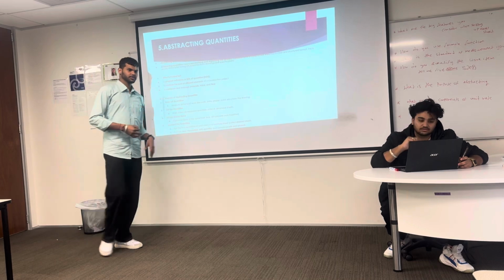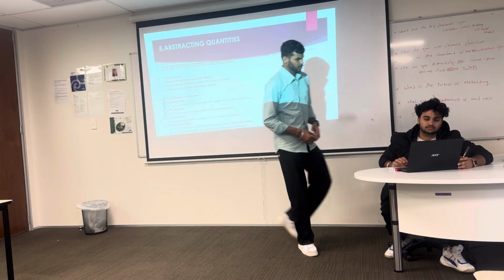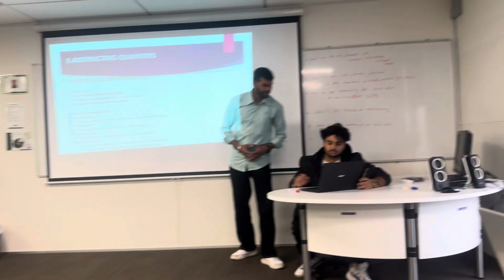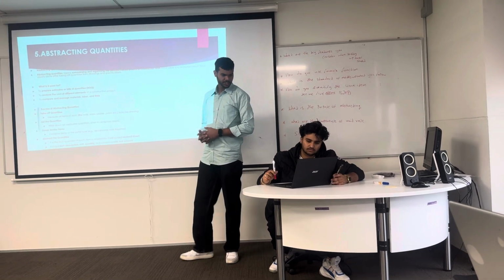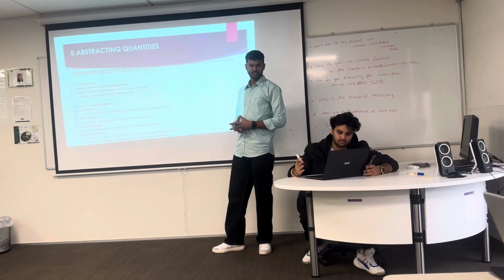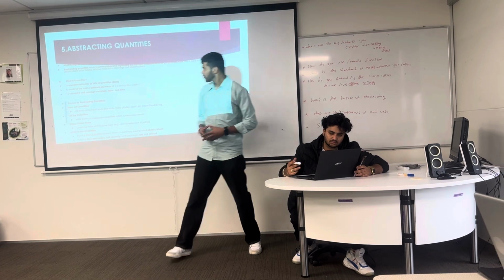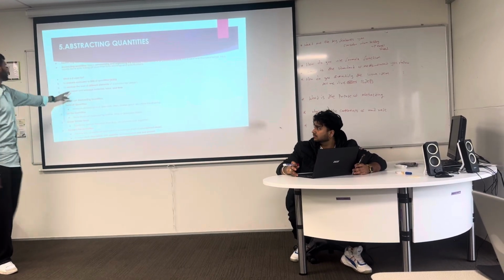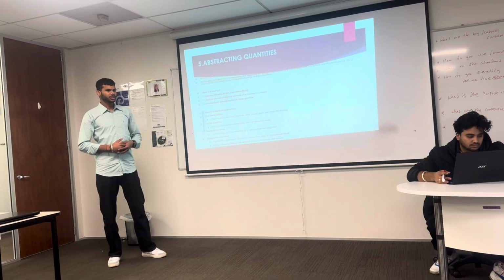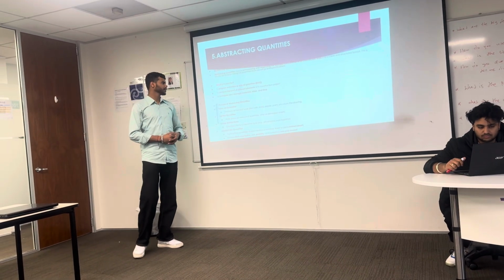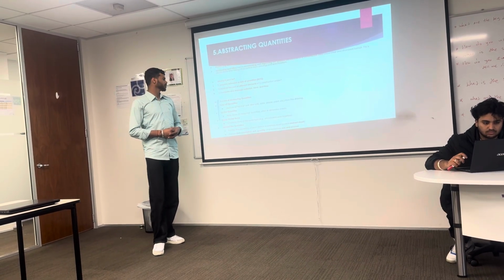So this is usually done after taking the quantities from drawing as per the specification. So the abstraction of quantities is done after the construction project is designed, and the use of abstraction of quantities is to prepare the estimate or the bill of quantities. So this provides an estimate of how much material, labor, and cost should be involved in the project.